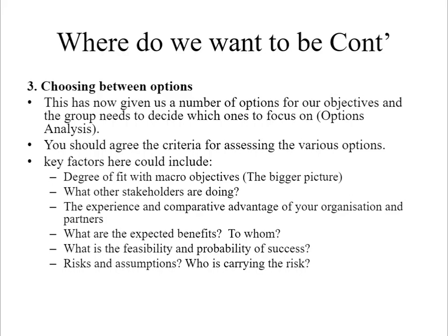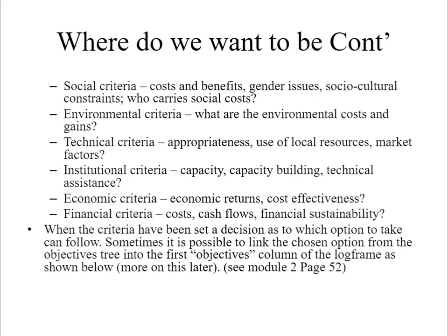the degree of fit with macro objectives, what other stakeholders are doing, the experience and comparative advantage of your organization and partners, what are the expected benefits and to whom, what is the feasibility and probability of success, risks and assumptions, who is carrying the risk, social criteria such as costs and benefits, gender issues, social cultural constraints, who carries social costs, issues to do with the environment, technical, institutional, economic, and the financial, such as cash flows and financial sustainability.